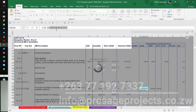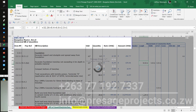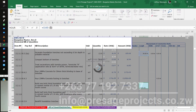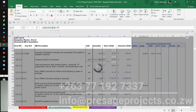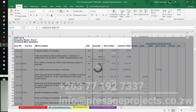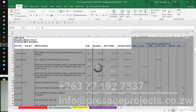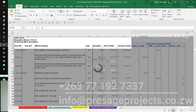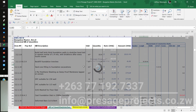The last four measurements are all internal walls — I'll assume those to be 115 millimeters. In my setup I simply bring that measurement in to get the internal walls measurement, and then the 32.26 also comes over here for the backfilling.